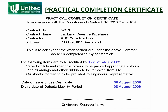The practical completion certificate is issued like this — this is what one looks like. Oftentimes there'll be a few minor items that need to be fixed, minor omissions, but they don't stop the practical completion certificate being issued. They are just required to be done by a certain period of time — you can see they've been given a month. It is dated, and that's when the clock stops. It also states when the defects liability period finishes.